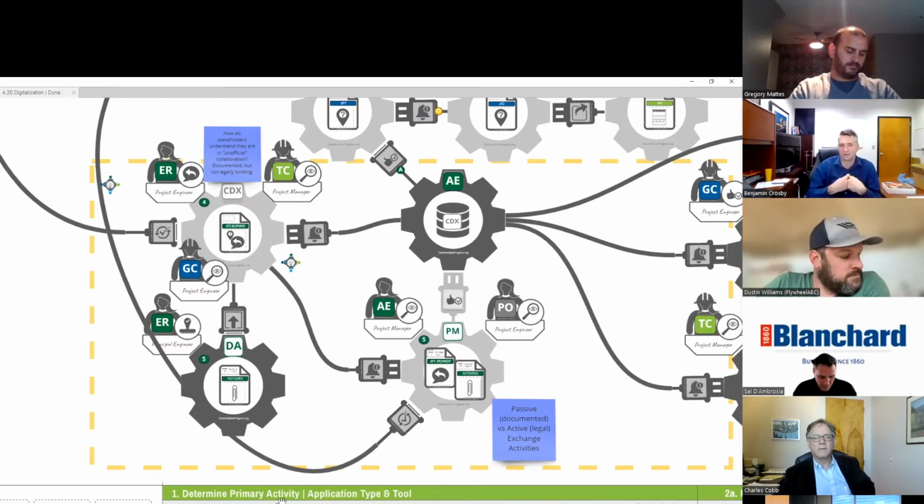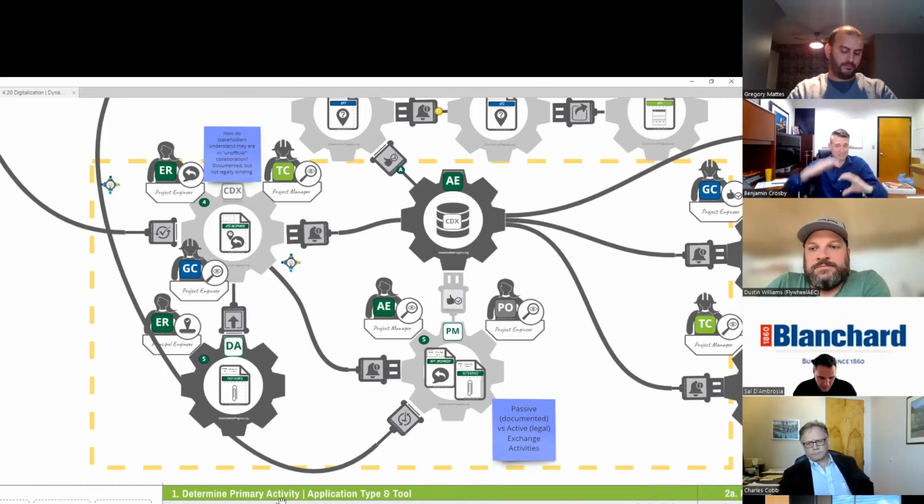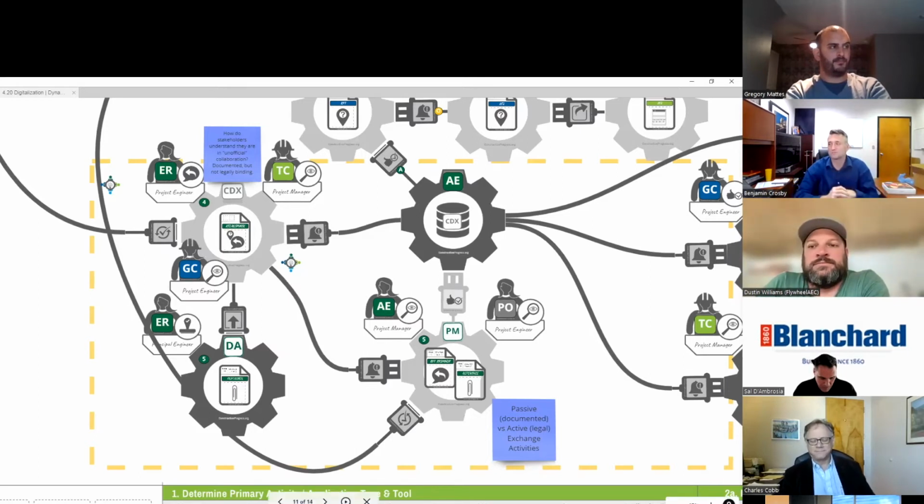everything is comments, everything is suggestions. And then those comments are all tracked, and then one is marked, this is the answer. And you might have to cut and paste from some of the others to get that one. That is the answer. The comments are there, the answer is there, and then the architect engineer says replied or answered, and that kind of walks it down, right? They can still have more comments, but you can't go back and change that answer without it being very obvious. Does that answer the right thing for you, Peg? Yes, I think so.